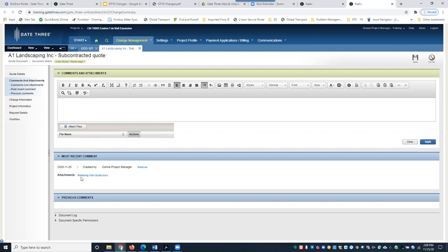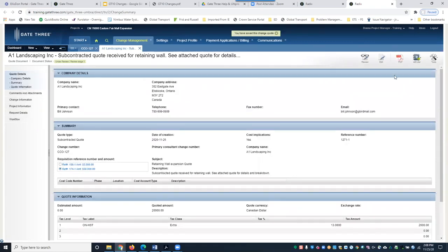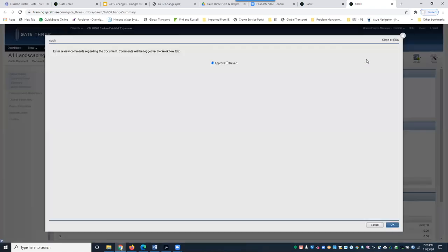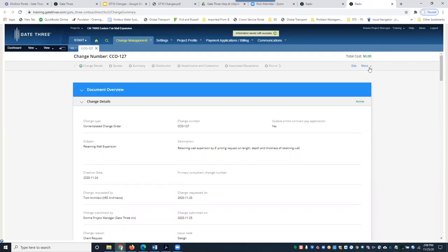Once you've attached the file and added comments, click Apply to save. Go back to Quote Details and save. This is the quote we logged from our subcontractor. However, it still needs to be reviewed by the PM of record — the PM will review and then approve or reject it. Get into the habit of clicking Refresh, as there can be a slight delay before the status updates.